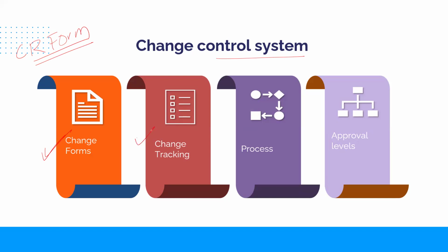And then we need tracking mechanisms. When we say change management, a prerequisite for successful change management is configuration management and version control. All our project artifacts, charter, business case, plan, all these documents, the core baseline, are subject to change, right? So we need some kind of version control. Let's say we have a requirements document, version 1.0. Tomorrow, a couple more requirements get approved. I'm sure you understand we won't go and overwrite the document. We'd like to maintain a history, right? Who made the change?